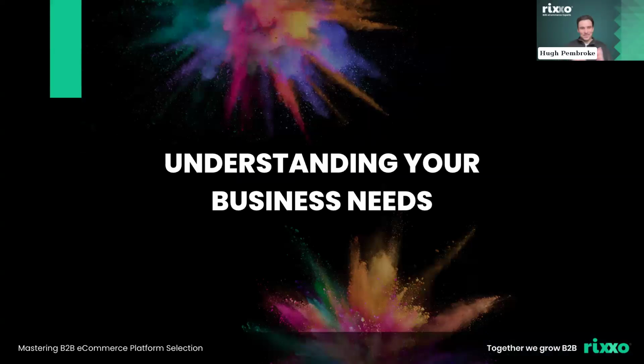Thanks, Chris. So based on that, the absolute critical part to this, like I said, the North Star for your RFP process, needs to be about deeply understanding your business needs. Before you even kick off any of the RFP documentation, it's really important that you get a clear understanding within your stakeholder group about what business needs need to be addressed by the project, which will help guide all your discussions with agencies and platforms moving forward to make sure anything that's being recommended is always coming back to how it's addressing that business need.